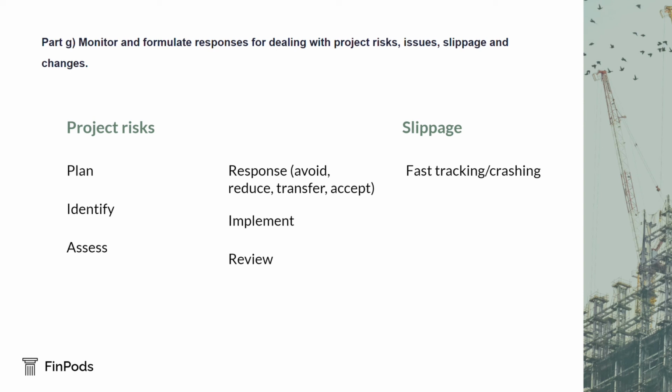Project change procedure. Some of the reactions to project slippage would involve changes that would significantly affect the overall project. Other possible causes of changes to the original project plan include the availability of new technology, changes in personnel, a realization that user requirements were misunderstood, changes in the environment, new legislation like data protection. The earlier a change is made, the less expensive it should prove. However, changes will cost time and money and should not be undertaken lightly.